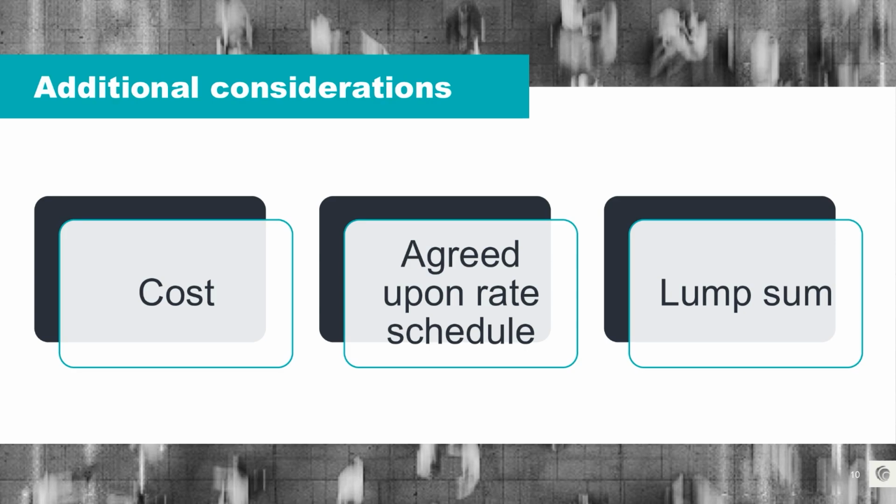these terms include: when labor is billed at actual cost, transparency and documentation are critical. So we want to ensure the contract requires detailed timesheets, certified payroll documentation, and proof of fringe benefits. We also need to confirm that we have the right to audit the labor records in order to prevent inflated charges. We then want to look for caps on reimbursable hours and prior approval for overtime. The risk we're really looking for here is that billing at actual cost can lead to uncontrolled spending if not monitored closely.